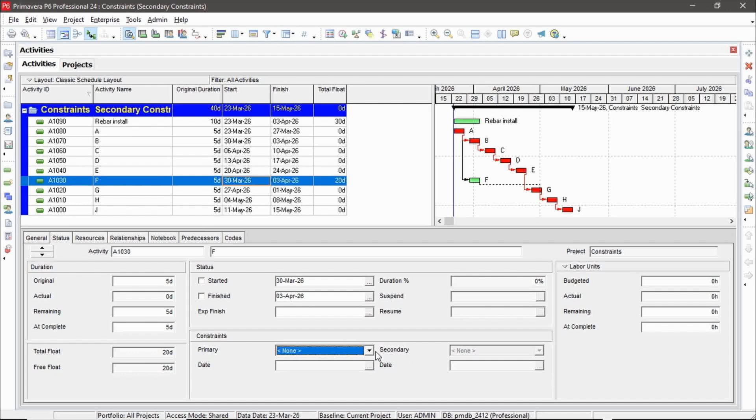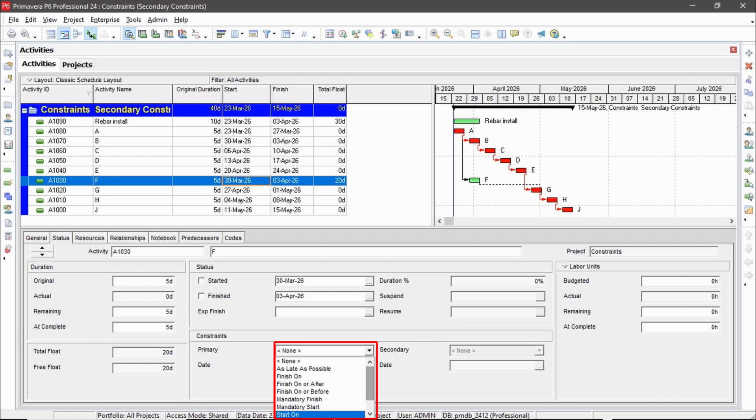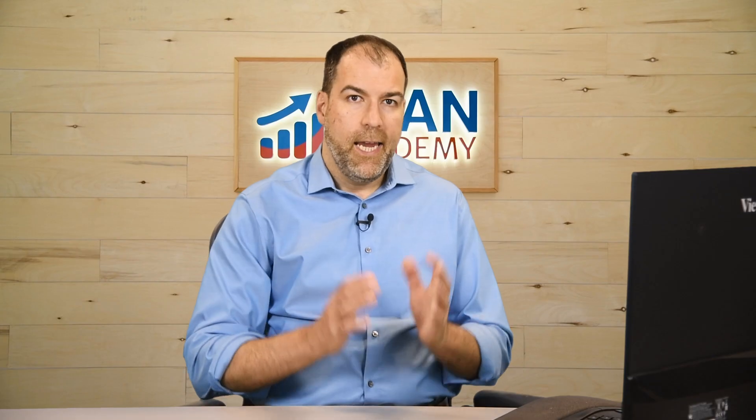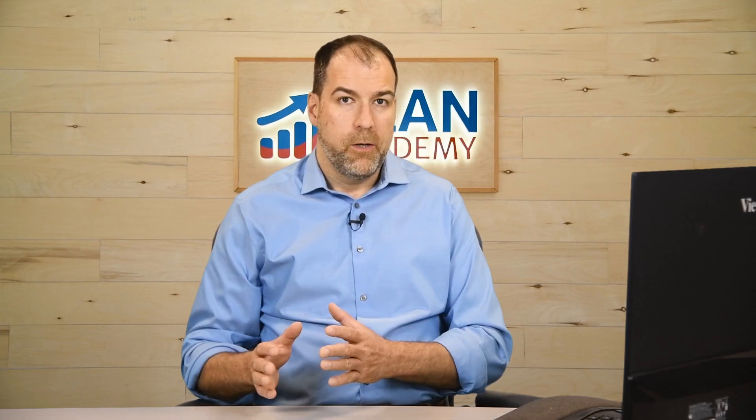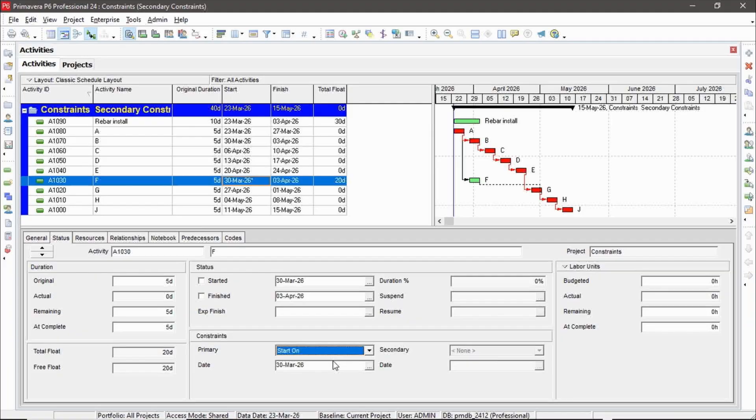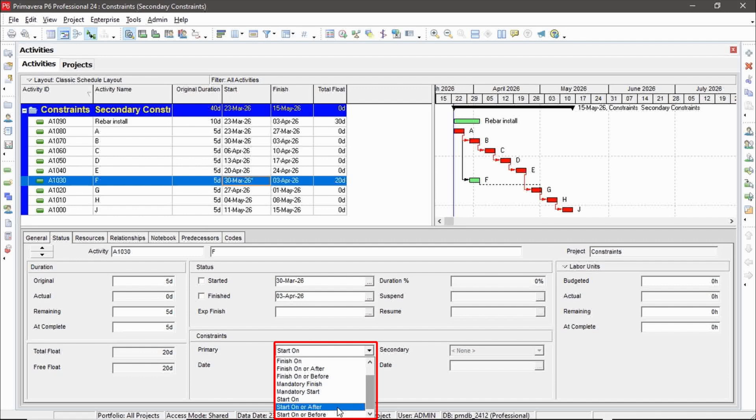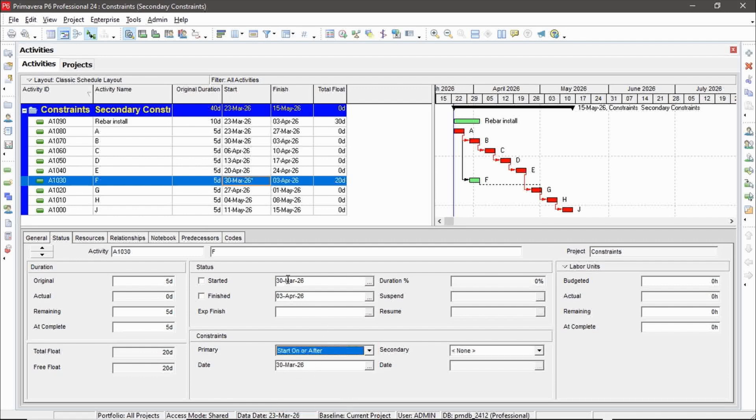So let's go and explore some combinations of these two. So what's a combination we might use? We might say start on, actually, yeah, start on. But notice when I pick a start on, secondary still is grayed out. So I can't use it with start on or finish on. I can only use it with the other ones that provide more of a range. So start on or after or start on or before.